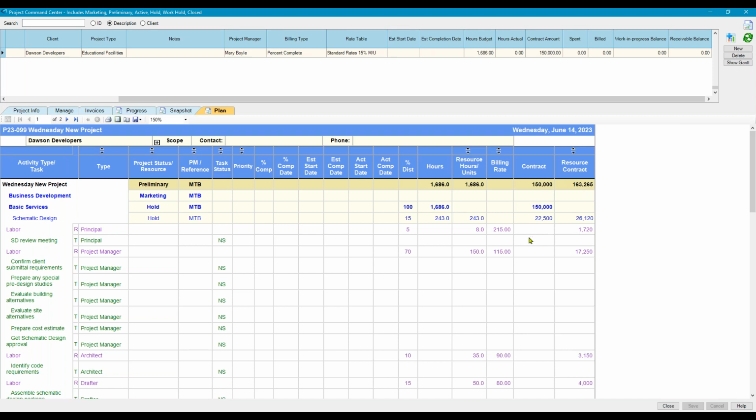Beautiful thing about that is it's these purple resource hours that are pushed out to your schedule manager or pushed out on widgets for hours assigned to the team, which has been something people have been talking about forever. I might budget all these hours, but I know the team can do it in less. I want to show them what I think they can do it in.